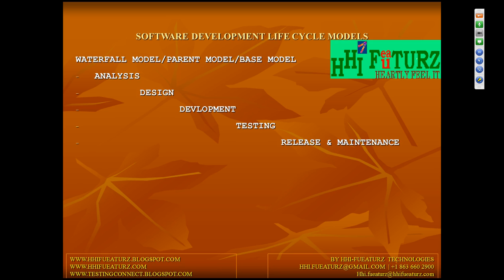Then the development team refers to these design documents and comes up with their development activities. They divide the entire application into different modules, submodules, and sub-submodules, and take the smallest independent component. They start by developing that component, then slowly integrate and enhance the entire application. So that's how they develop.